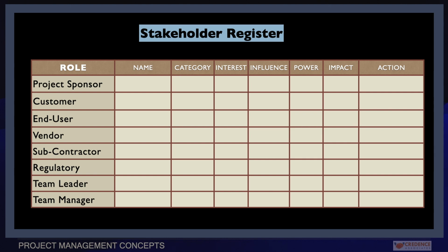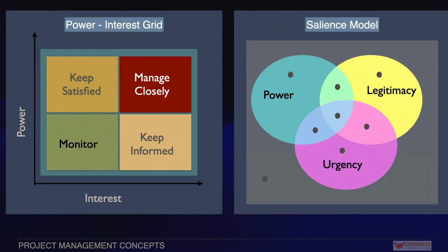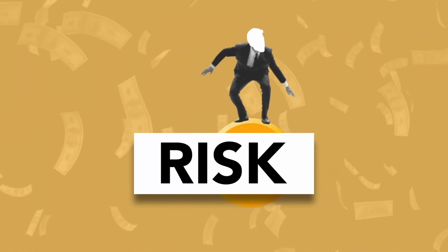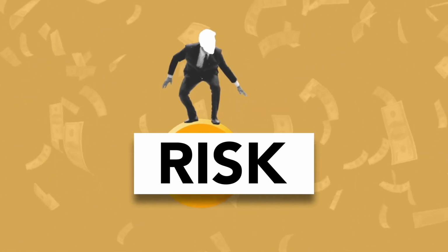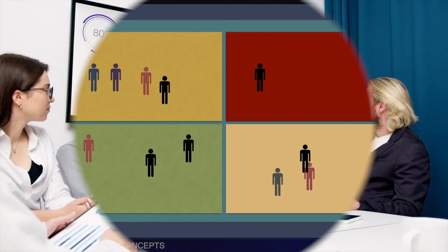The stakeholder register is a live document and becomes a source of lessons learned for other projects in future. Stakeholder analysis involves systematically gathering and analyzing the stakeholders qualitatively and quantitatively, such as salience model, grid analysis, stakeholder cube, influence matrix, etc. New risks may be identified, leading to opportunities and threats. Based on the analysis, prioritize the stakeholders.